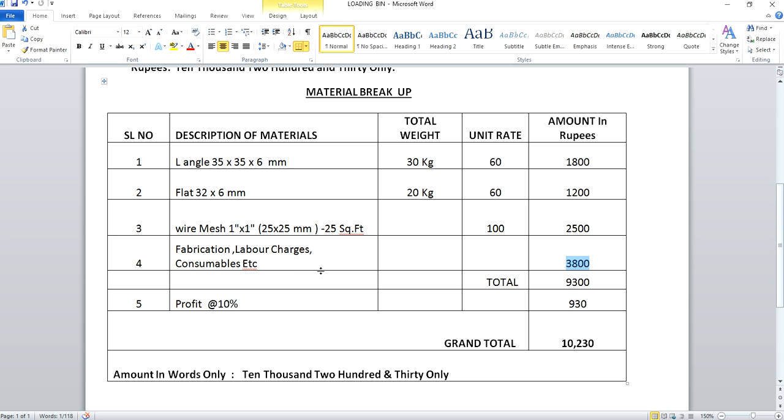And these charges, suppose if the materials are provided by some other client, and you are going to fabricate the steel bin only by using labor, then you need to spend only labor charges, and these labor charges will be on an average 15 rupees per kg, based on the current market, and it varies depending upon the mild steel price also.